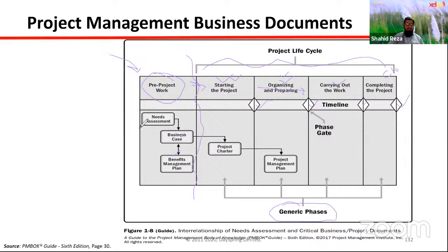All right. From the needs assessment or feasibility study, we write the business case. I will discuss in later slides what the contents of the business case are. And at the same time, taking some input from the business case, we will create the benefits management plan. That means before starting the project, this approved document should be in your hand. This is important. All right.